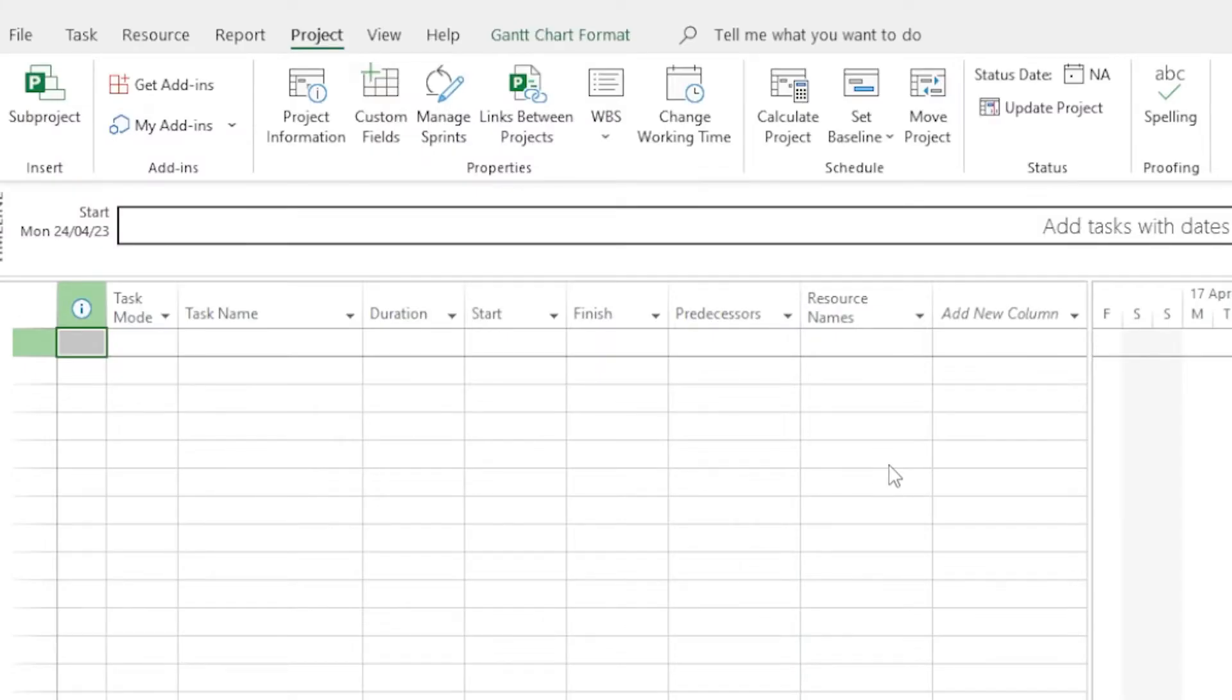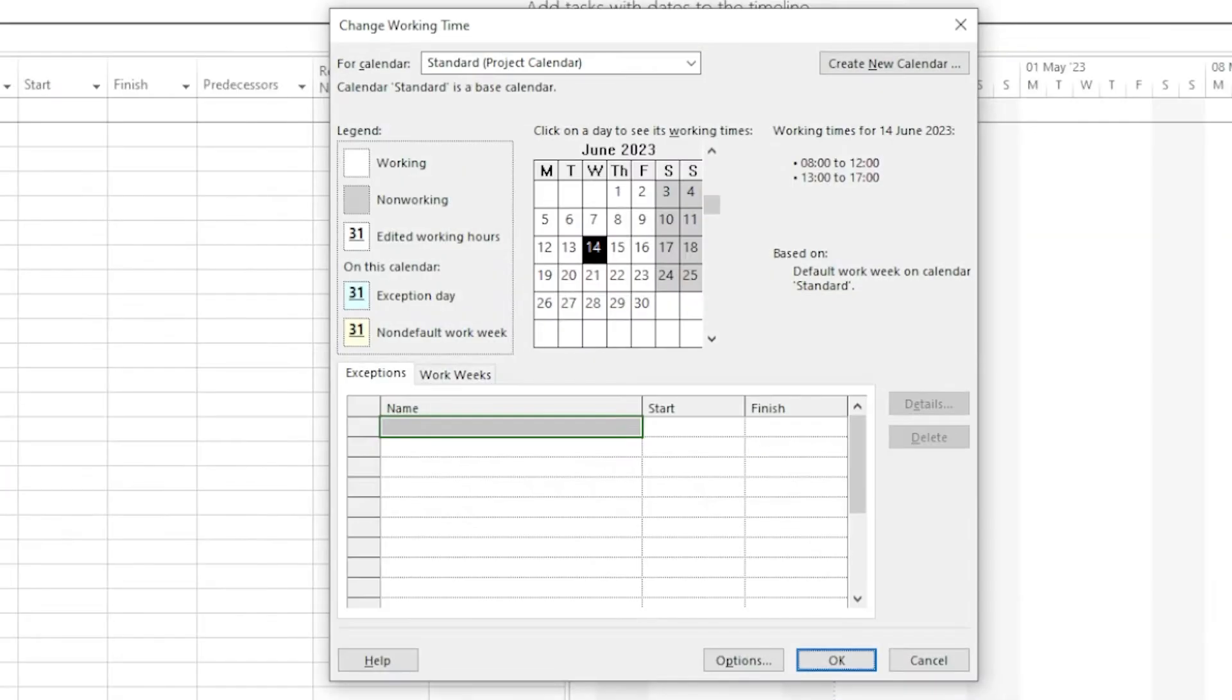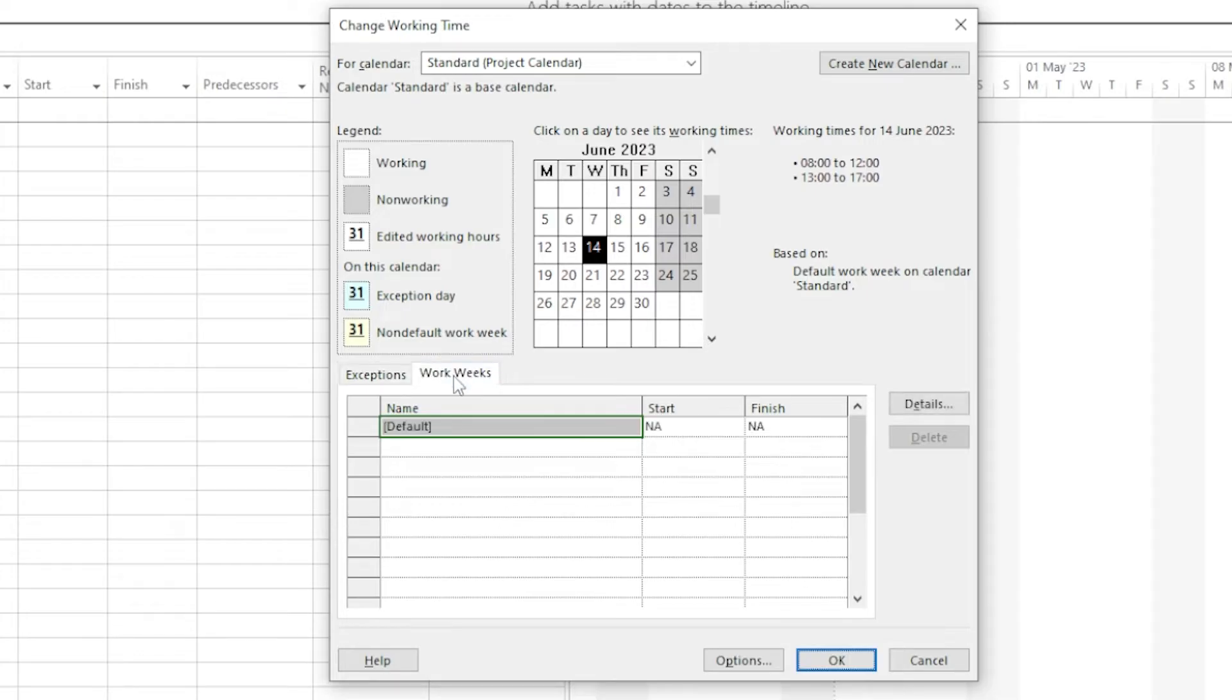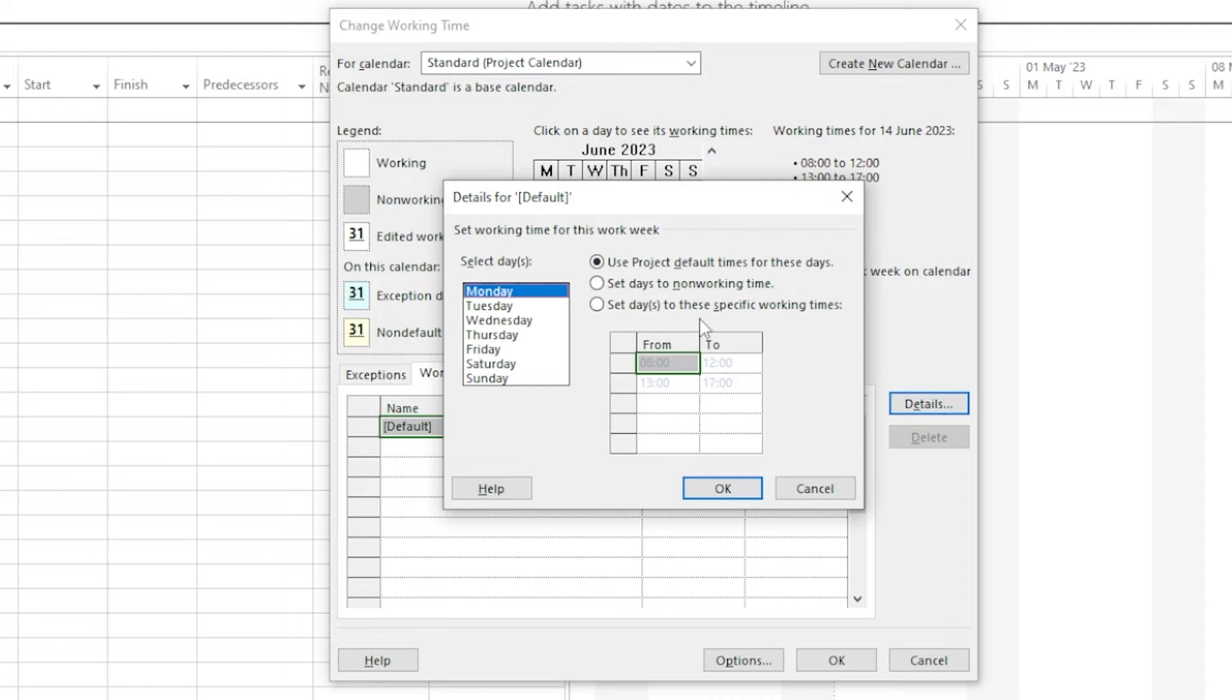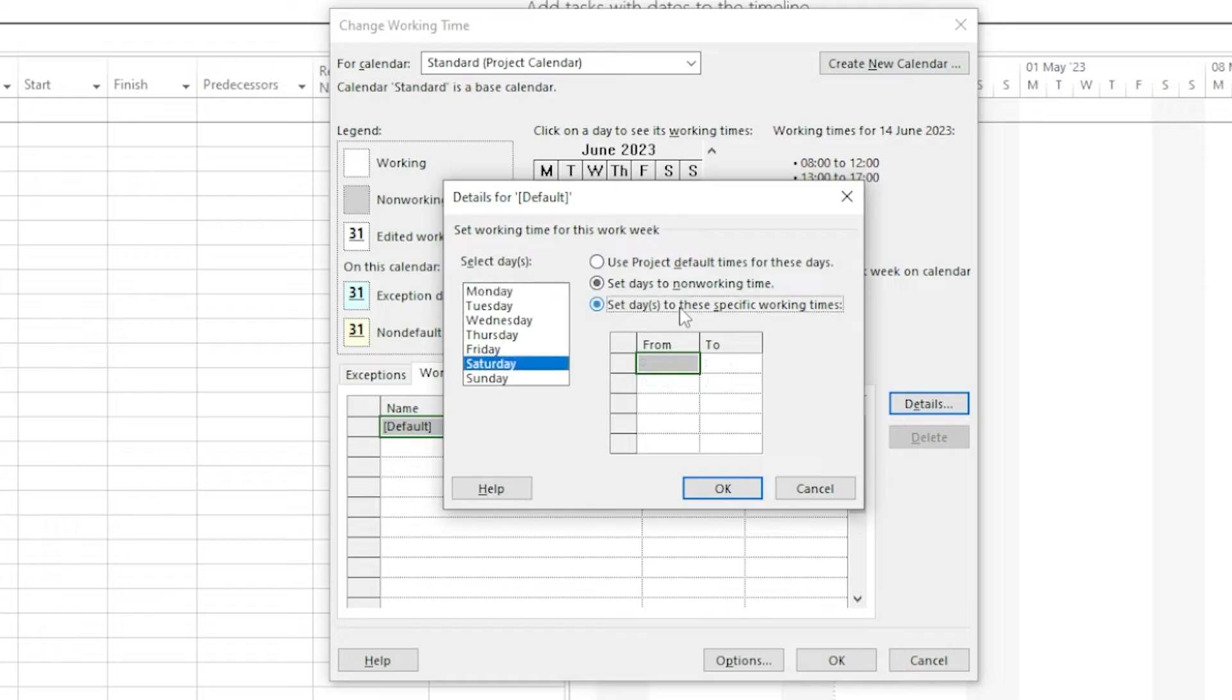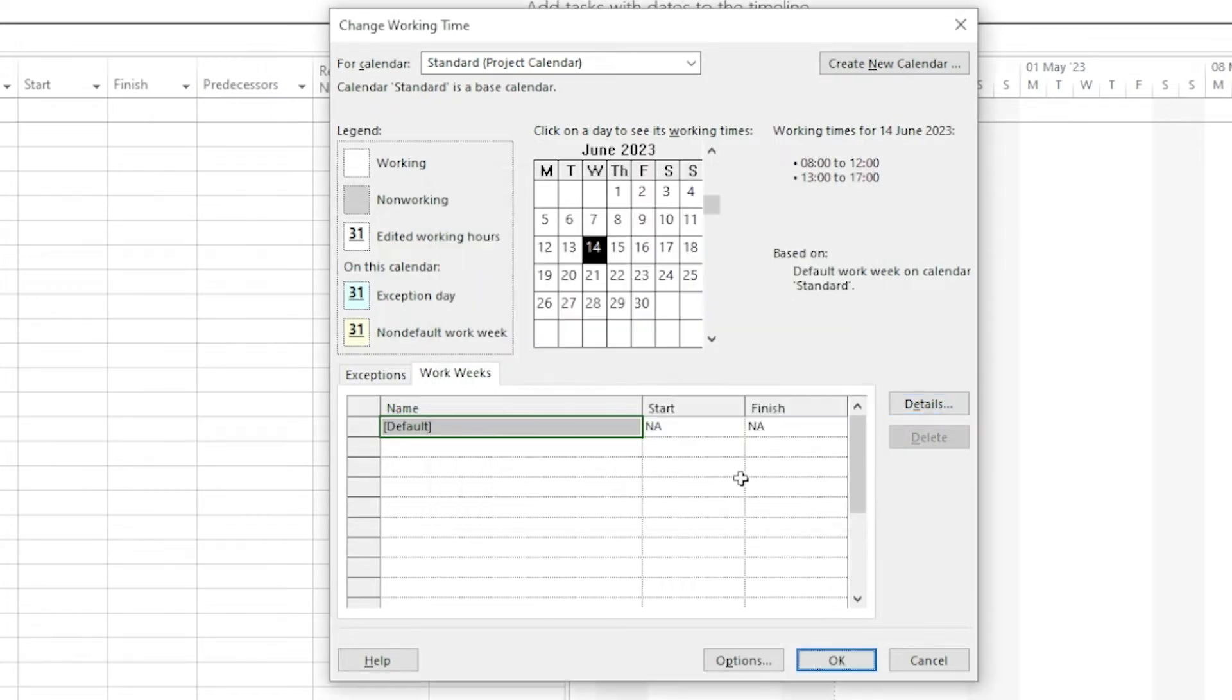Next, we're going to customize the working time. In the Project tab, click the Change Working Time button. In this section, you can change the default calendar from having you working Monday to Friday from 8 till 5. For this particular project, I'm doing a 7-day week. Yeah, you shouldn't really envy me. We're clicking Work Weeks and then click Details. From here, you can see all of the days and you can change the settings for each day of the week. Choose the day that you want to change and then select Set day to these specific working times. Now you can change the From and To times. Click OK when you're done.